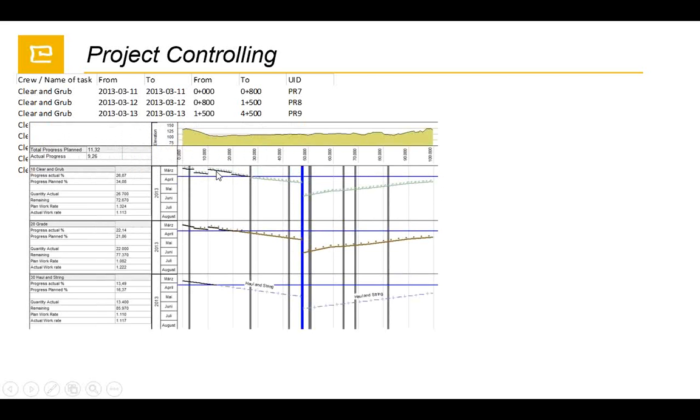Later when I show in the system, when we activate the baseline, we will see the baseline in the background. For example, this task will be later than the plan because the baseline goes continuously here. So even this view is good for claiming purposes. On this data date, the works are completed, but they are completed after the planned date. So there is a delay here.